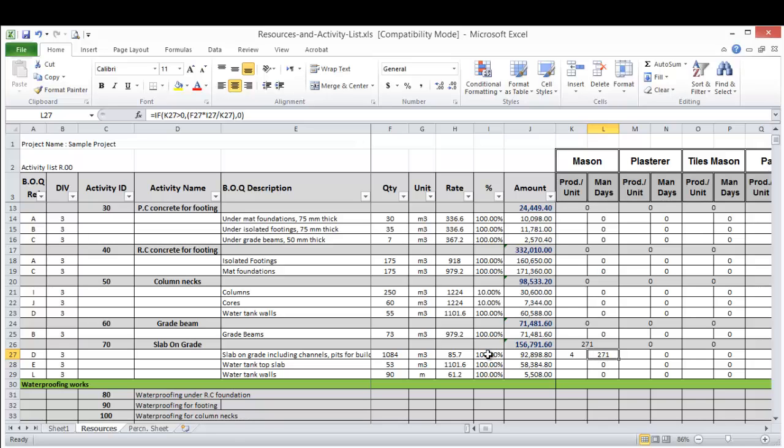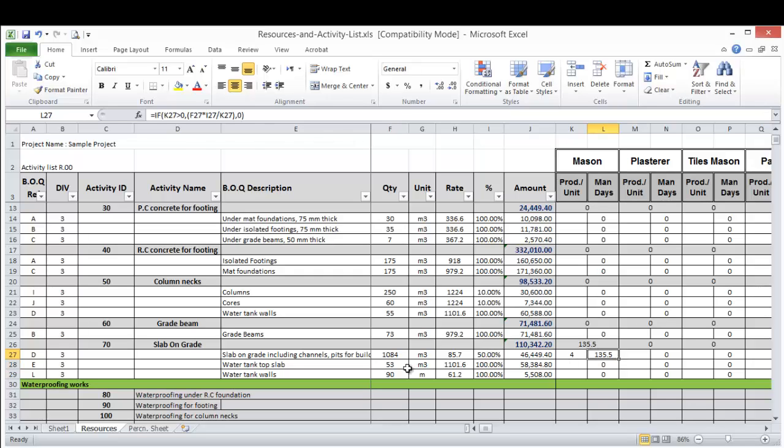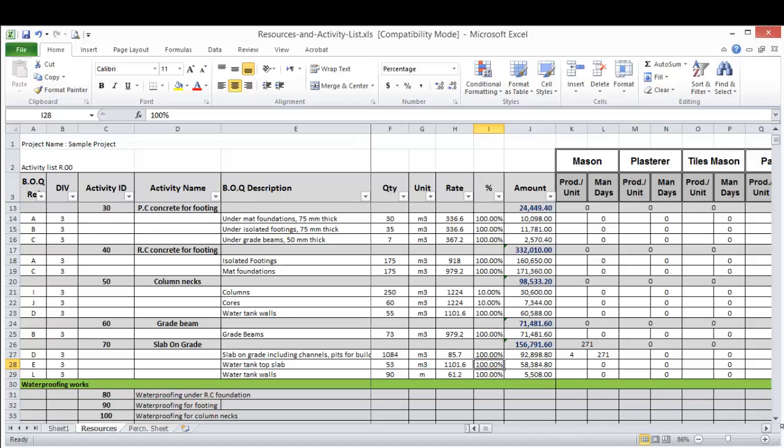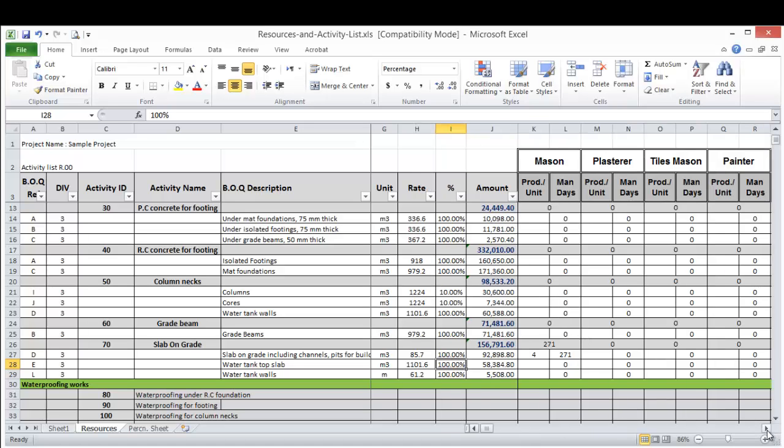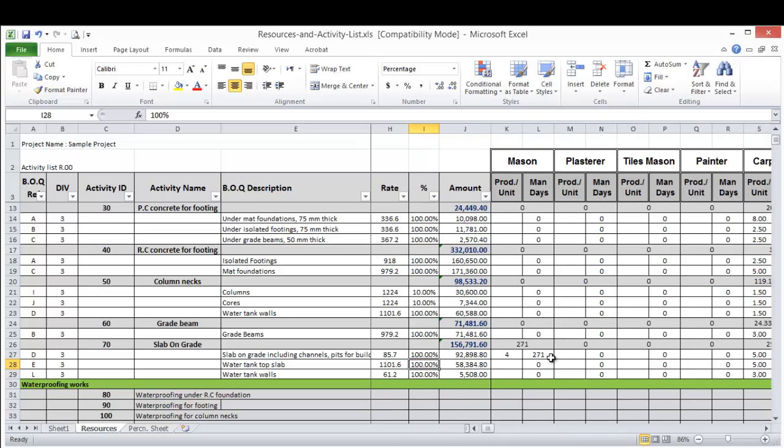So if this percentage is 100%, it will give me the total, the whole quantity. Let's say if this is 50%, then it will make the calculation for only 50% of this quantity.